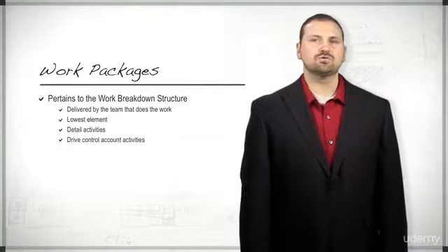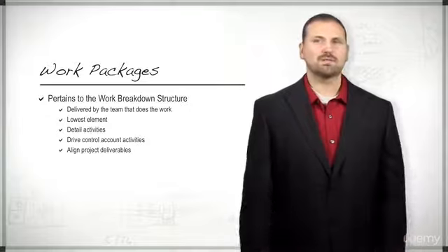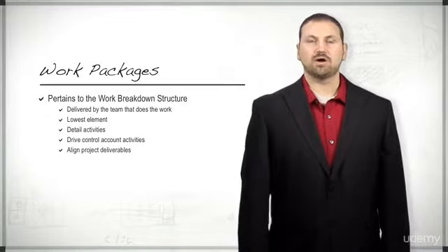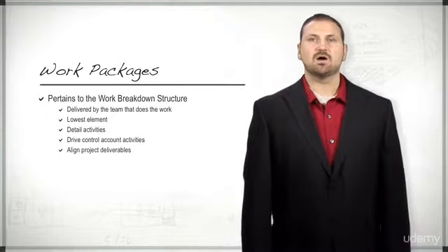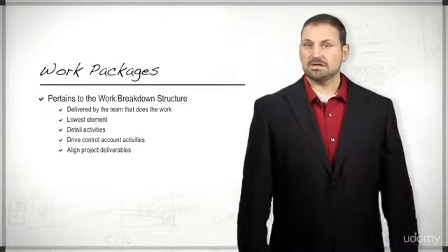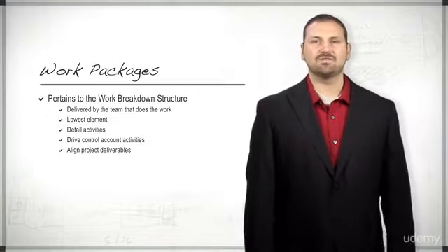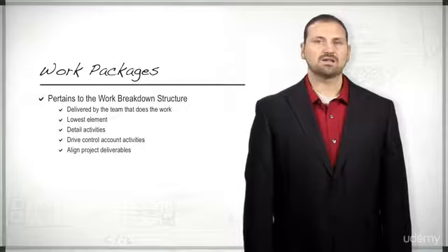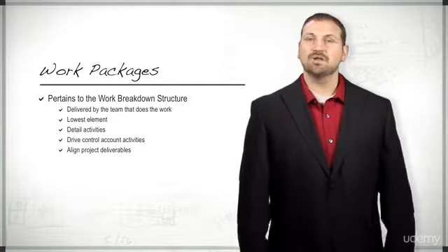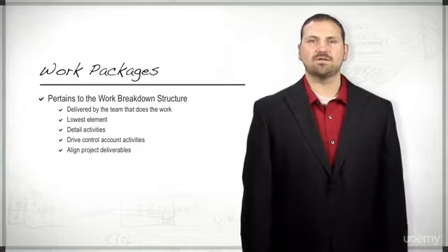Control accounts are used to align project deliverables to accounting requirements and ultimately the project's budget. The project manager needs to oversee the manner in which expenditures hit a project's bottom line. If they spend too much money up front, they run the risk of not having the future funds to complete the project. Control accounts enable the project manager to plan on what needs to be spent and when it needs to be spent throughout the project lifecycle.